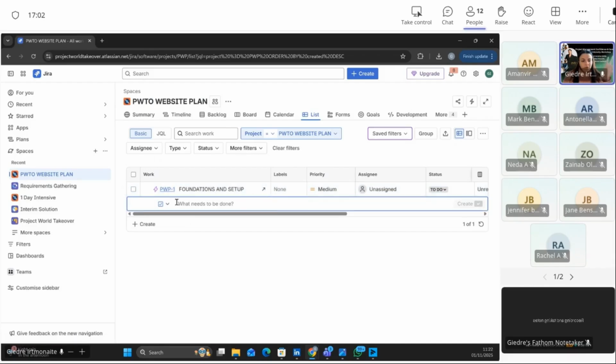So then, for example, what we would do is break the epic into stories. In Agile, a story should say, as this, I want to do this. That's the most appropriate way to write a story, and I do believe it makes it easy to elaborate what you need to achieve. However, no one really does it that way.